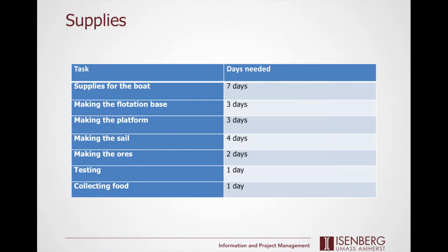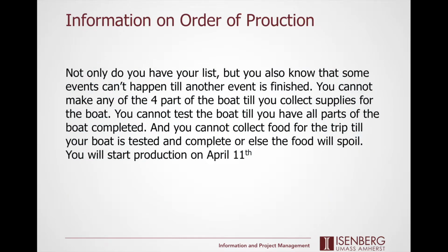So, collecting the supplies is something you just do, and then you start working on the boat. But when you work on the boat, you take the morning for one part of the boat, 2 parts of the boat in the afternoon, and then another in the evening. So you work at it at the same time so they can overlap day-wise. Then you need to test the boat, and you need all 4 pieces done before you can test the boat.